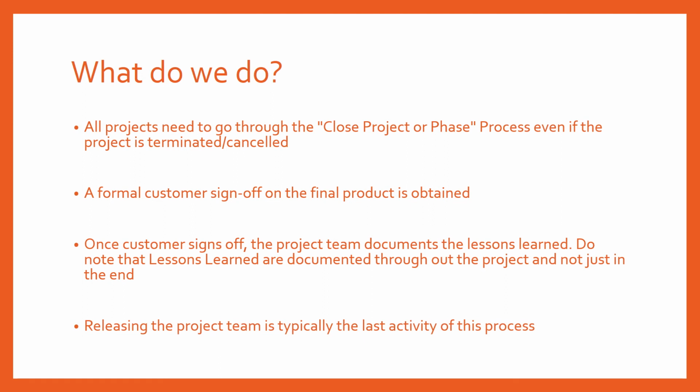Finally, the project team is released. This is typically the last activity of this process. So in close project or phase, the last activity typically is to release the project team. Remember, you cannot release the project team before getting the customer sign off. You cannot release the project team before the lessons learned are documented, right?